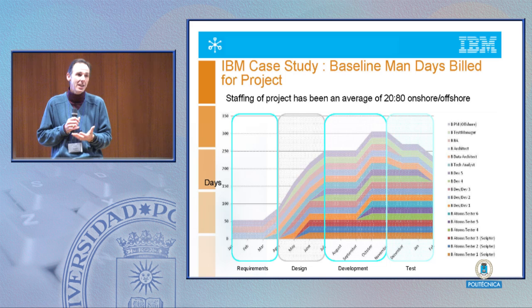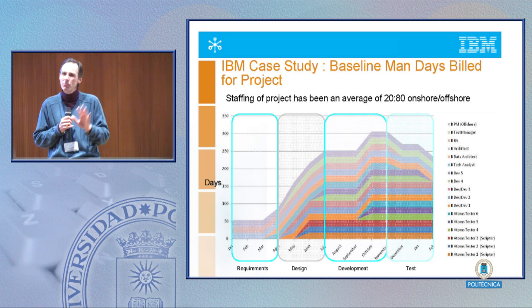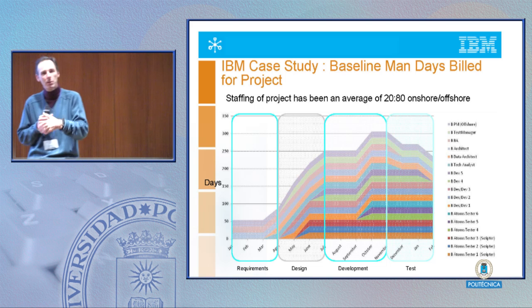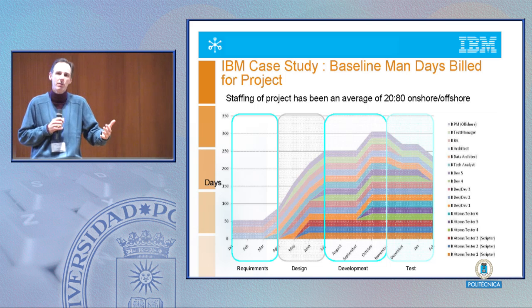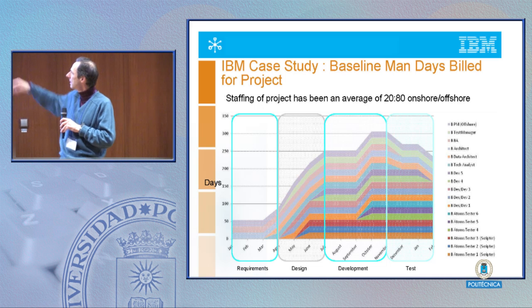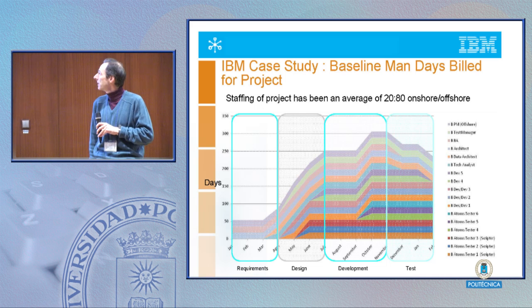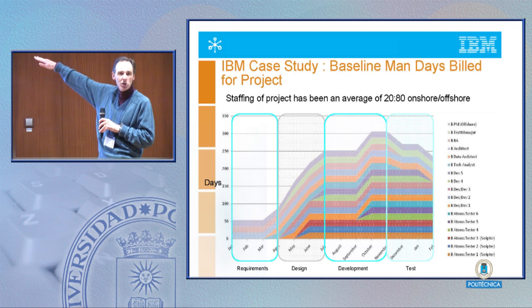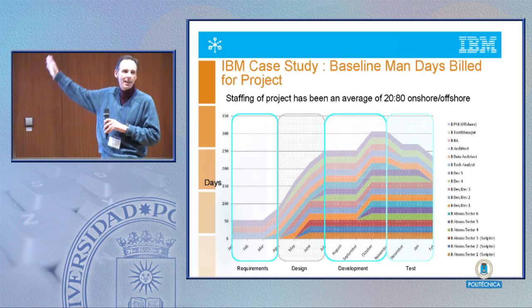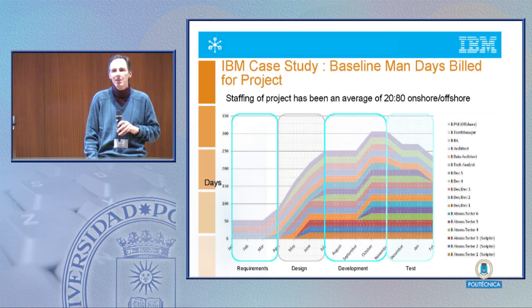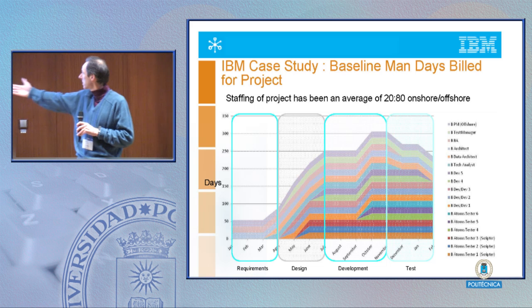We get more and more stakeholder input. Is that what we said? We didn't really mean that. Oh, okay, well, that's what we built. Well, we need to quickly fix that because that won't do. We won't be able to get that released. So we have this big spike of effort late in the implementation development stage as we get into test. We do as much testing as we can, and we kind of declare success, and if we can, we try and release it as close to the deadline as we promised. And this is typical, and this is what actually happened.